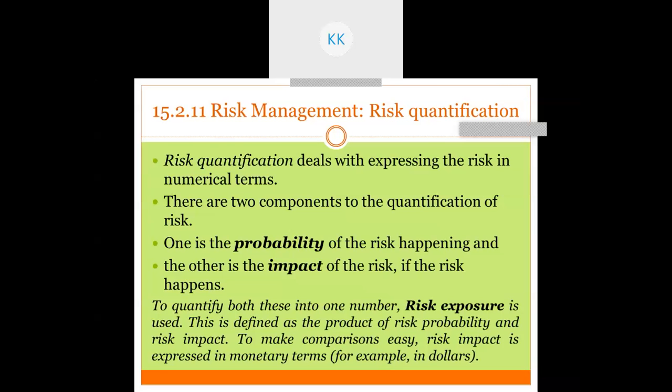You quantify both these into one number, risk exposure. When you multiply your probability with the impact, you will get a risk exposure, right? By using this risk exposure, you can classify whether the risk is simple, or risk has major impact, or risk is extreme.